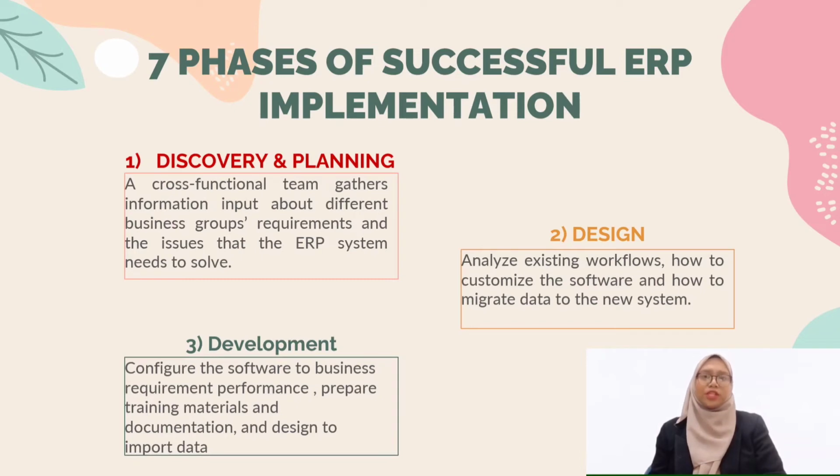The ERP project team typically includes an executive sponsor, a project manager, and representatives from the departments that will use the system. The involvement of senior management is crucial in order to ensure the project receives the resources it requires. During this phase, the team may select and acquire an ERP system once the firm gets a clear understanding of what it needs. One major decision is whether to use an ERP system that runs on premises or cloud-based.